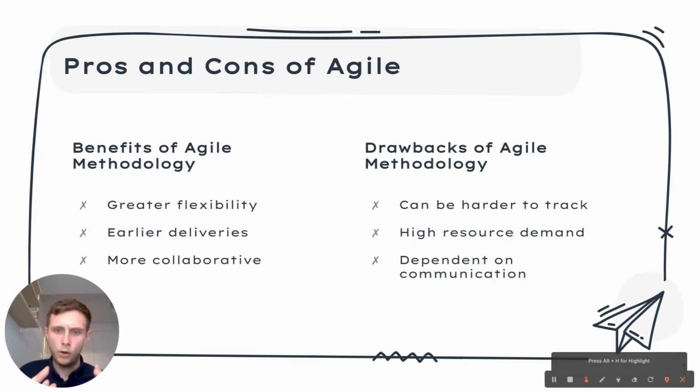Because we're doing all of our work at once, we are designing, building, testing, and delivering in a very short window, it means that we have a really compact resource structure. We've got to get all of our different experts, all of our different project team members working at the same time, whereas in our waterfall process, it might have been stretched out.